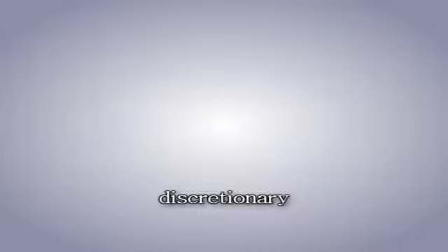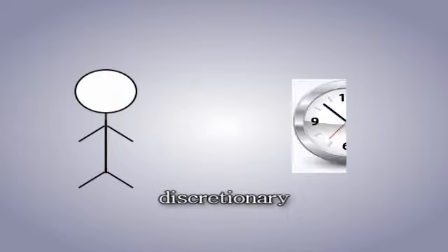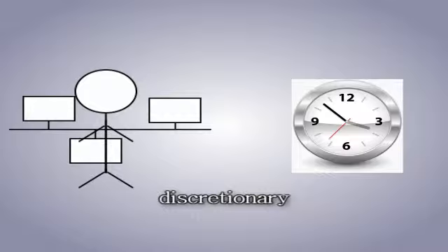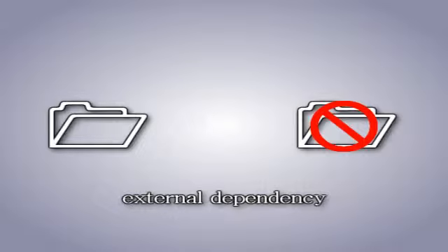example of a discretionary relationship could be that a programmer may only be able to contribute half of his or her time to a project, although his or her skills could be used full-time to shorten the timeline of the project. Another type of relationship is called an external dependency. It involves relationships between project and non-project related activities.